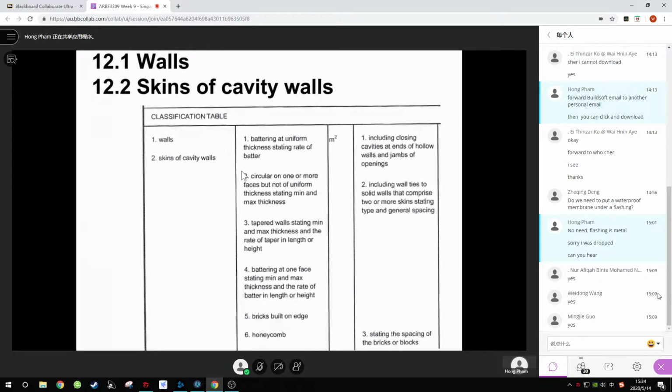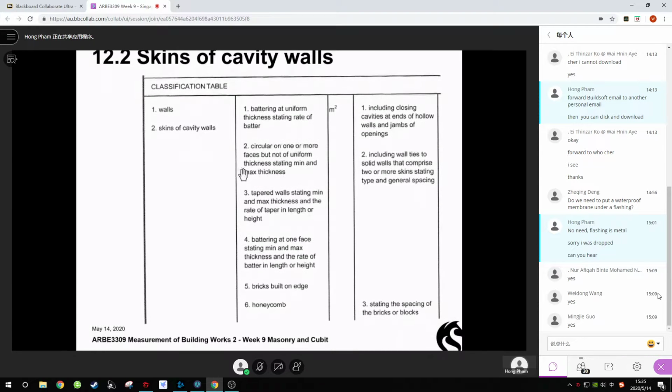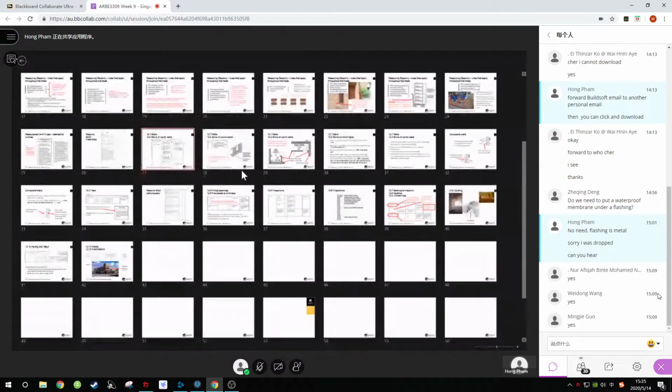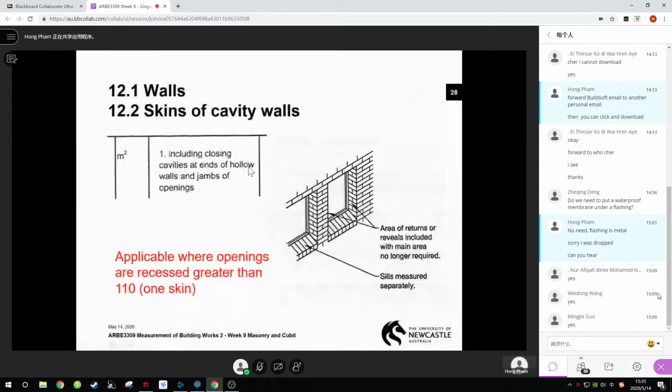a window frame or a brick wall, a cavity wall that's greater than 270, and it's got a wide cavity, because normally our door frame or our window frame will fit in across the cavity, or there'll be a storm mould so it fits in across the cavity. If you've got a wider cavity, you have to block the end of the cavity, so the end of the wall turns around and comes in to the window frame.